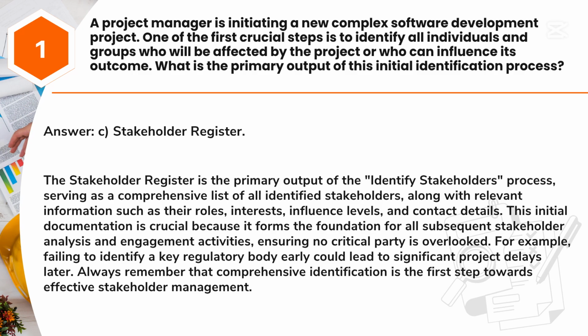Answer: C. Stakeholder register. The stakeholder register is the primary output of the Identify Stakeholders process, serving as a comprehensive list of all identified stakeholders, along with relevant information such as their roles, interests, influence levels, and contact details. This initial documentation is crucial because it forms the foundation for all subsequent stakeholder analysis and engagement activities, ensuring no